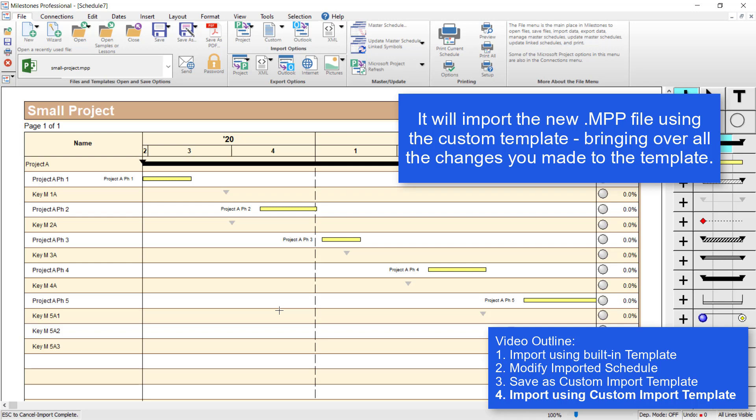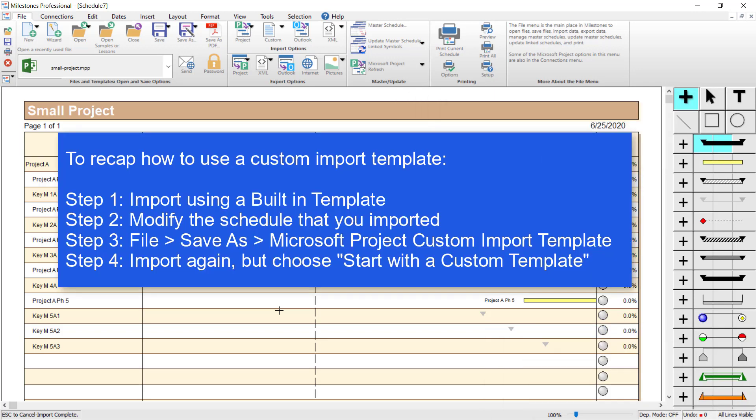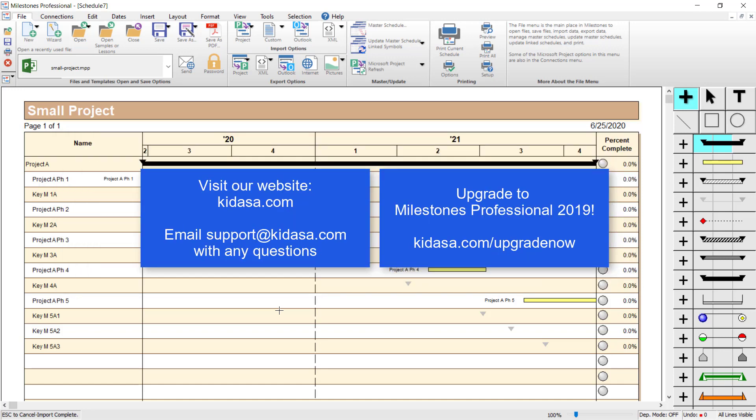That's pretty much how you import using a Microsoft Project Custom Import Template: first import using a built-in template, then make your formatting and layout changes, then go to File > Save As > Microsoft Project Custom Import Template, and then you can import using that template later. I hope you enjoyed this tutorial about importing from Microsoft Project using a custom template. If you have any questions, you can email support at kidasa.com. Don't forget to visit our website at kidasa.com — have a nice day!